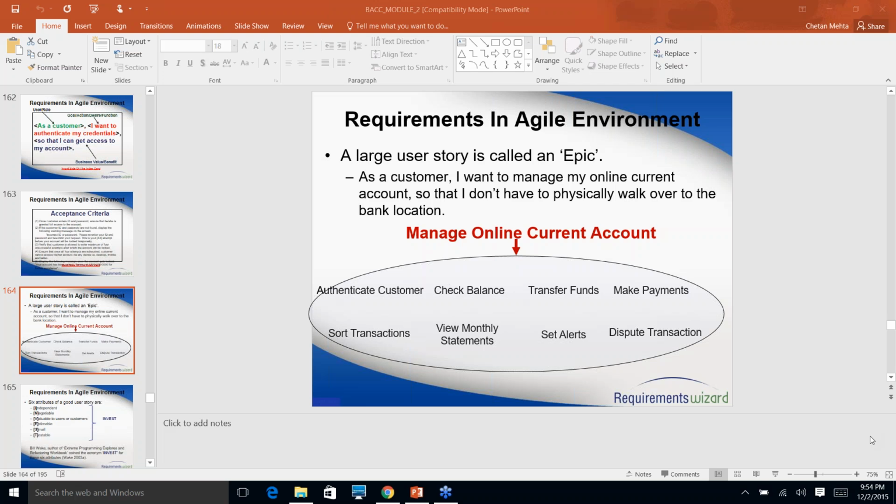So Chetan, I was actually reading something on it, and the way they explained was that you take the smallest user story and make that your relative point, and then you compare the other stories to that. Whatever your smallest user story is, your large story and your epic would be compared to that. Right. We'll talk about how to do an estimation most likely tomorrow. But that's one way you can say which one is large and which one is small. But again, even in that, people have a dispute.